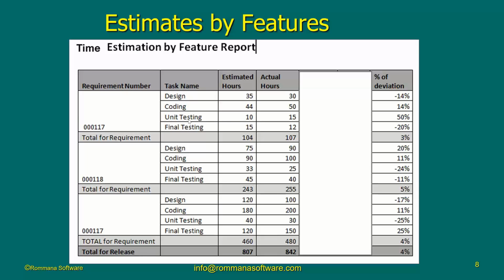So I am assuming we've taken some time to dissect the user story, to understand more about it. And if you listen to my webinars on scenario-based development and testing, you'll see that I always recommend that we build scenarios for user stories. And that scenarios are ways of breaking down the user story to help us understand the amount of work involved in the implementation or the building of the user story.